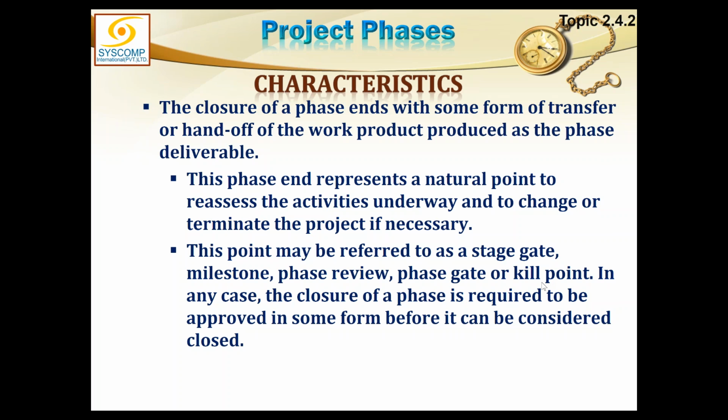So this is a decision point where you decide whether you want to move ahead with the project, move on to the next phase or not. This is a gateway. That's exactly why we are calling it a stage gate or phase gate. And at that point, we have achieved a milestone. That's why we call it a milestone also. So there could be many names for this point.